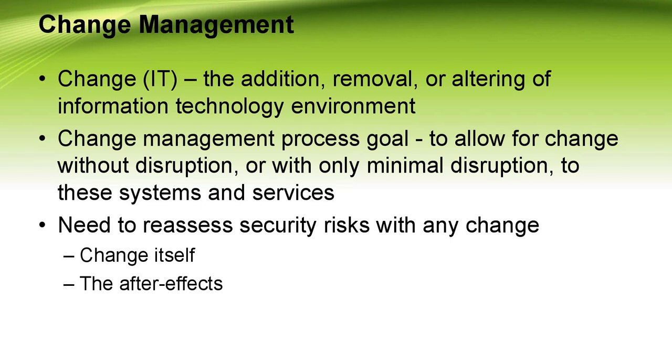Now consider an emergency change. Why might it make sense to implement a patch in production before testing? Proper assessment might show that the risk of not doing anything now outweighs any potential risk incurred as a result of an immediate patch.